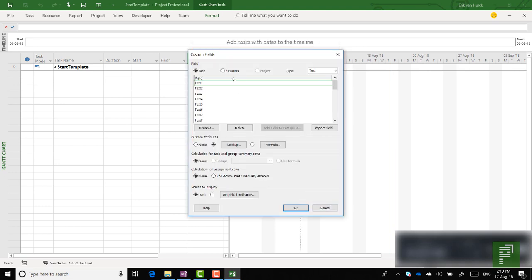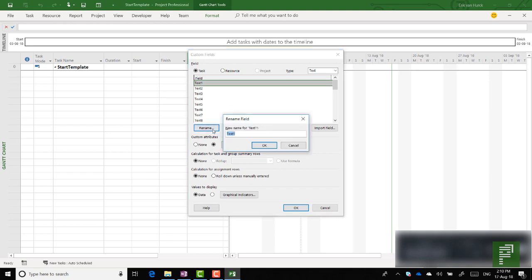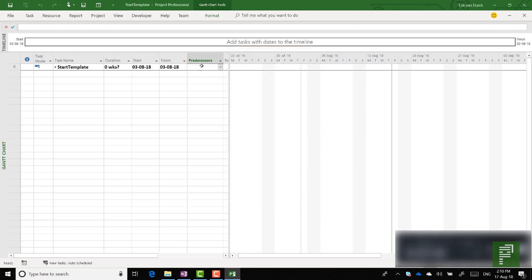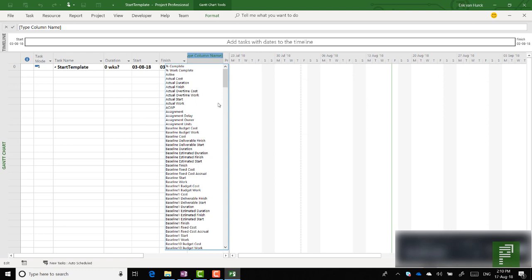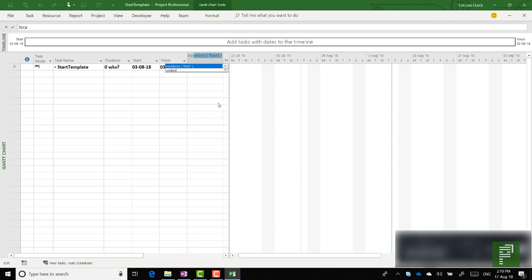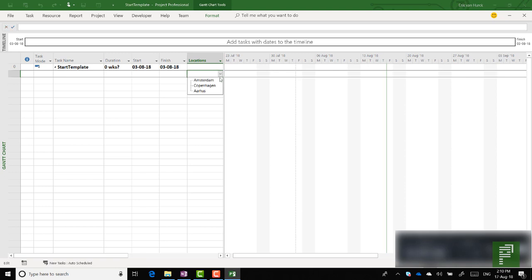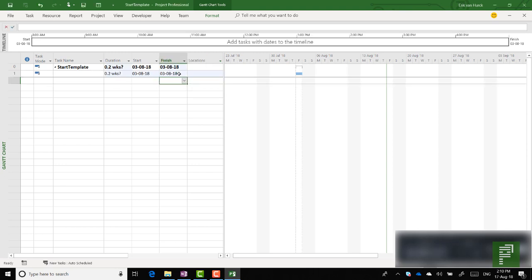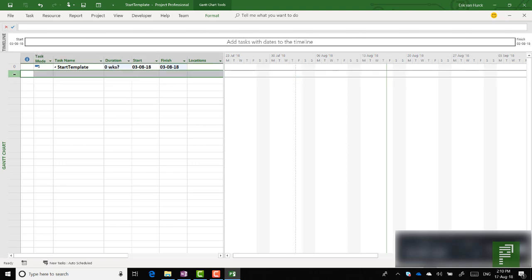If I click on Close now I can rename this as Locations. And if I click on OK I can actually find this by searching for locations, and I can have each of these lines filled with any of these values. The reason why we're doing this in a template is because we want each and every project that we're going to use within that program to have that field as an option so that we can do reporting later on. So locations of your organization can be one of them.